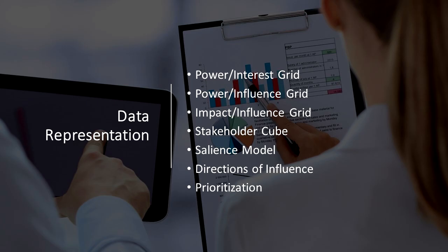We could also look at sidewards direction of influence, that is among peers of the project manager. For example, middle managers who are in competition for scarce resources, project managers who are also in competition for one reason or another, and any other people that collaborate with the project manager in sharing information.